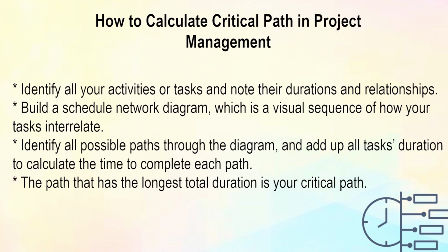Using the critical path method to map out each project's activity, predecessor, and lag, project managers may compute the entire project duration. The CPM is then used to determine the important activities, or critical path, required to execute the proposed project. A critical path diagram also includes non-critical tasks. These are operations that have more schedule flexibility and will have less influence on the project.